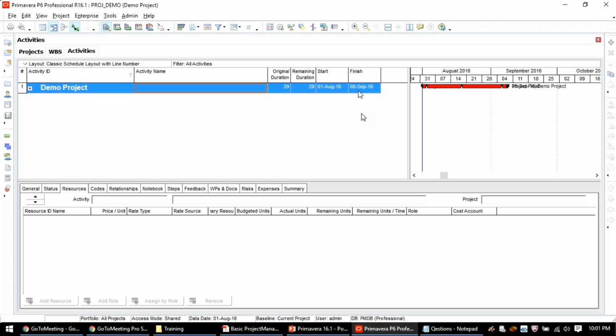That's it. Now you execute this project in the real-time world, and now I will look at only these 2 dates all the time. 29 days I'm giving time for you guys. That's it. That is called baselining or benchmarking. We'll say in Primavera it's baselining, or even in project management or PMBOK language we'll say it's a baseline. So you have done that baseline work.